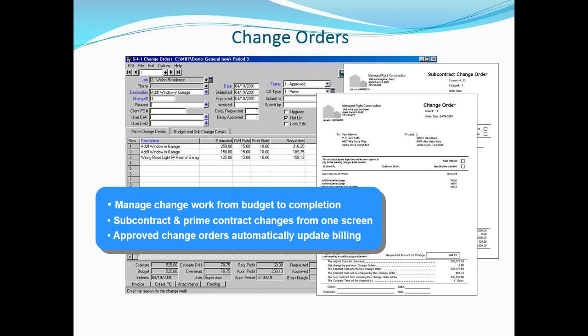Also, communicating the change orders that are outstanding, what's been approved, and having any change order that affects a subcontract automatically flow into the subcontract, handling that whole cycle. One of the biggest money losers in the business is that we forget to get a change order signed off, we don't bring it up till closing, the homeowner disagrees with us, and we just don't get paid for it.